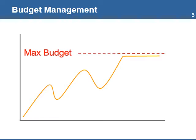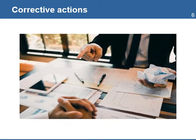This can include making trade-offs that will need to be discussed with management and the donor. Corrective actions might include the use of alternative options to produce similar outputs, for example, using different inputs or other cost-saving measures. Once you implement the corrective actions, you will need to monitor the performance to confirm their effectiveness in reducing the project expenses and helping bring the budget under control.